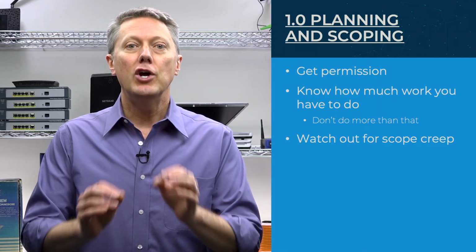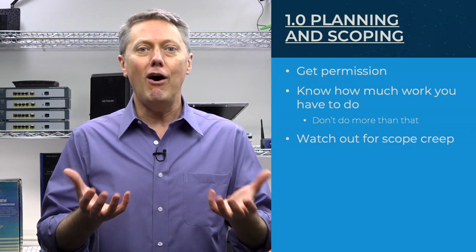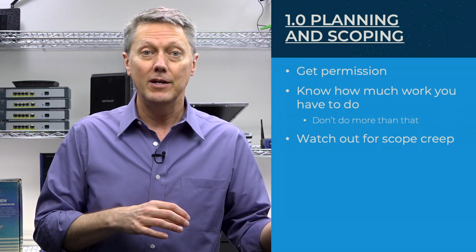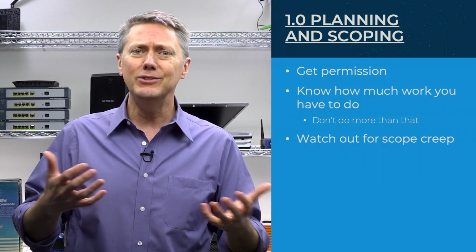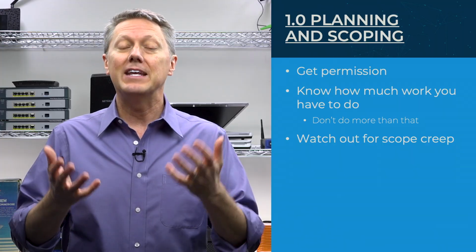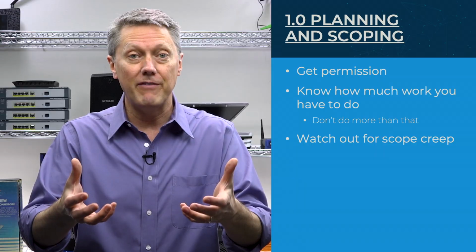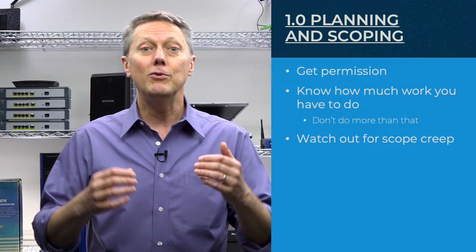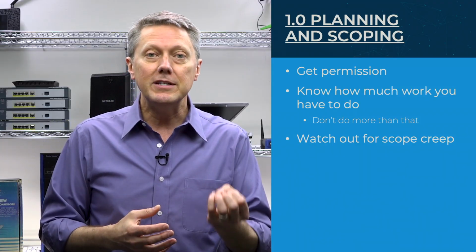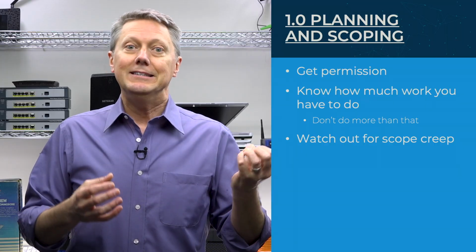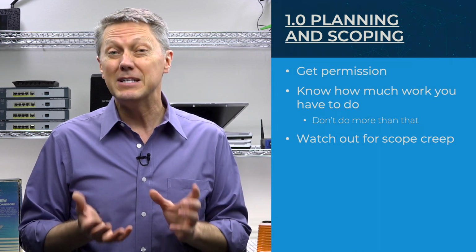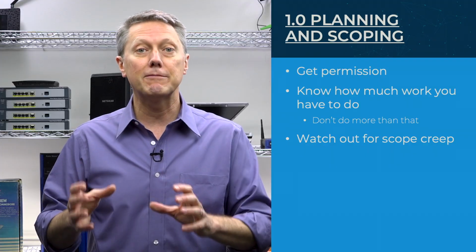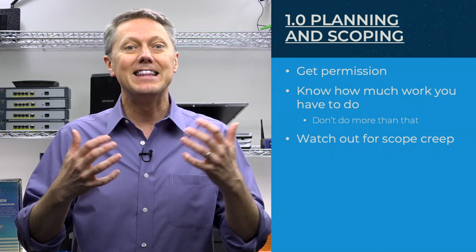It could actually have a subtitle, and that subtitle is Get Permission. Remember, a penetration test is all about pretending to attack a system. So you're really attacking a system, but you're really just kidding. You're pretending. How do you explain that you're just pretending? The answer is you go to the environment's owner and you get permission to be the bad guy. You do that through written permission. If you don't have written permission, you actually could be liable for any damages, and lots of bad things can potentially happen. So it's important that you always get permission, and you start that process in the planning process.